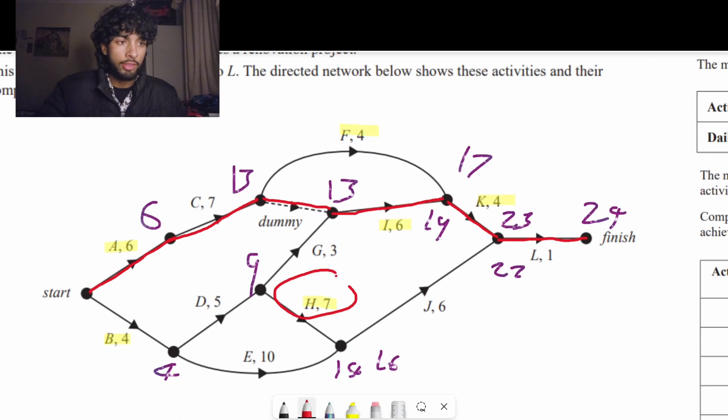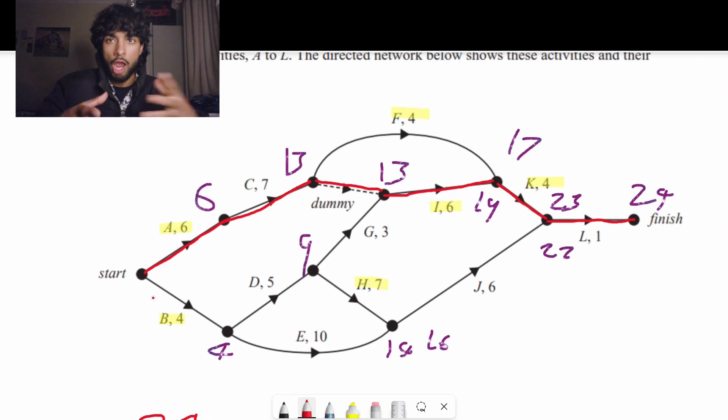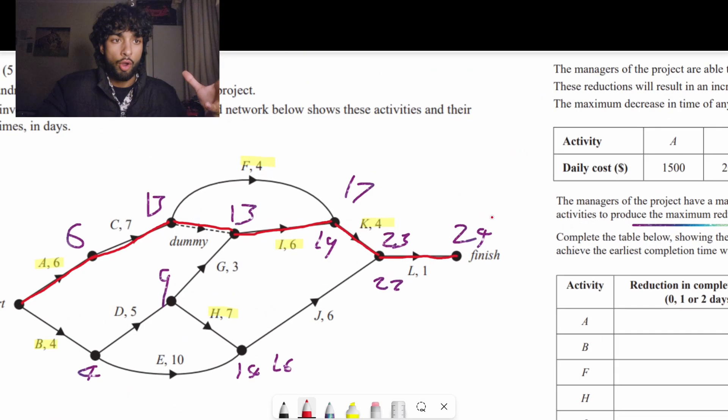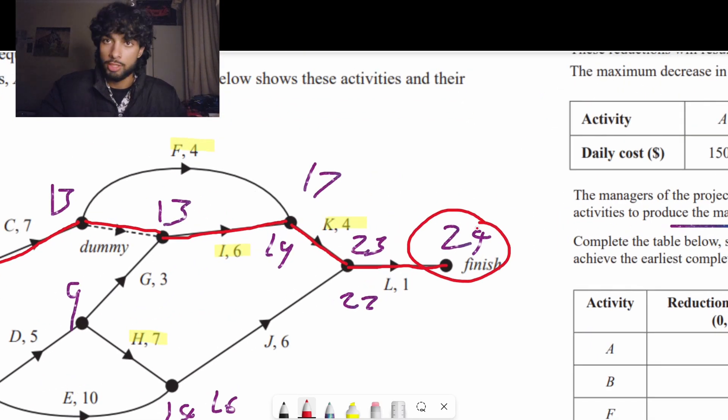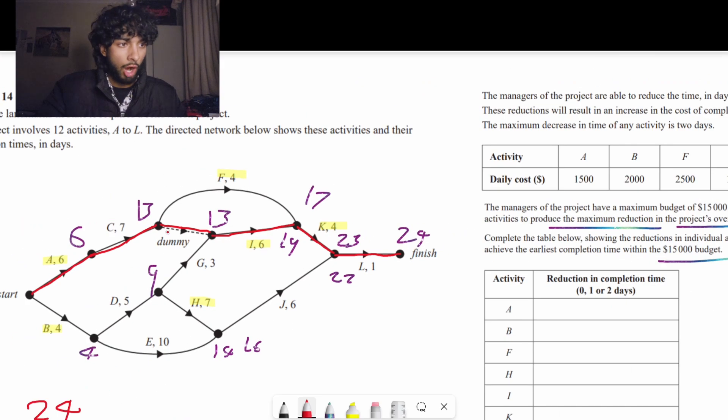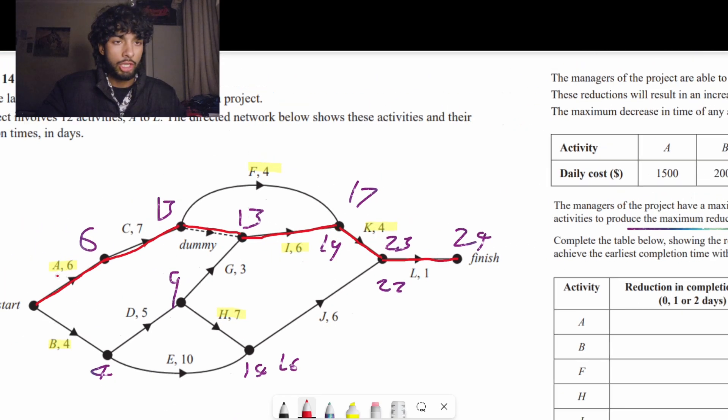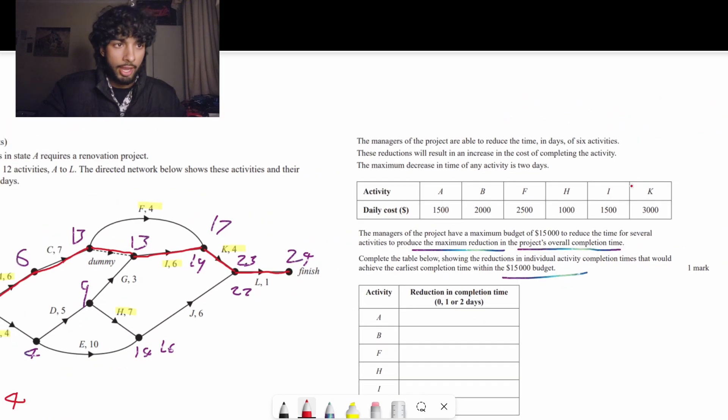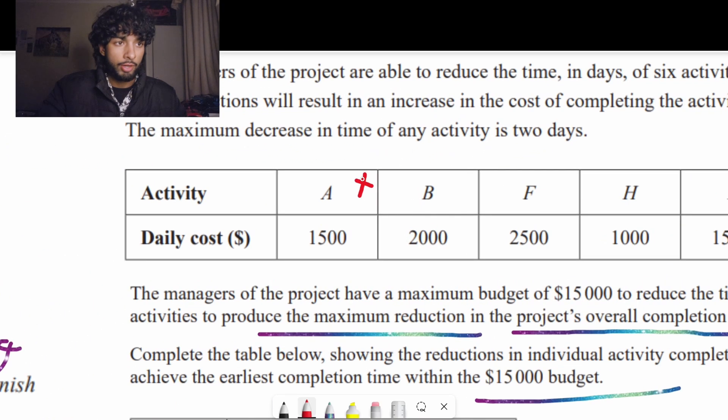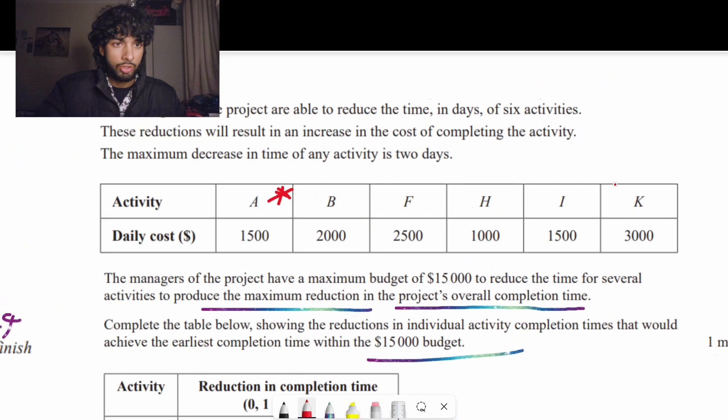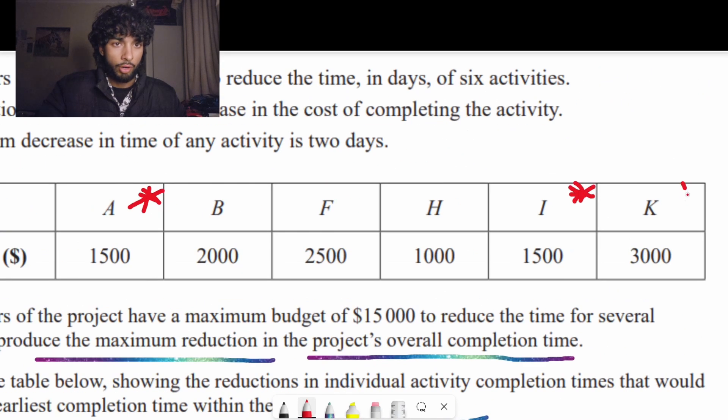Obviously we're not going to do anything with h and b because no matter how much we reduce that, the overall completion time of 24 still stands. So currently on the critical path is i, k, and a. I'll add an asterisk to show what is on the critical path right now.